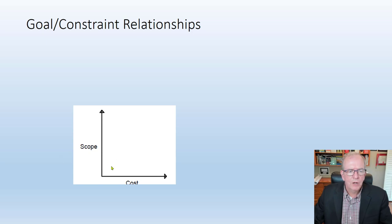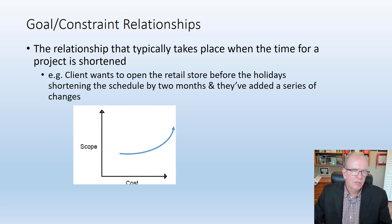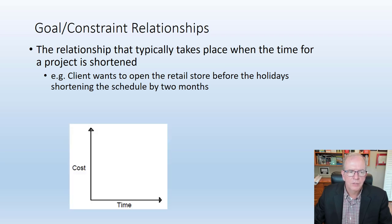When we think about scope and cost — if you don't have a really well-established set of drawing specifications and the client keeps adding things, when you add things it's going to add to cost. We intuitively know that makes sense. But the most interesting relationship is time and cost: if we fall behind and want to make up that time, or somebody wants this done faster than expected, that usually involves a bunch of steps.